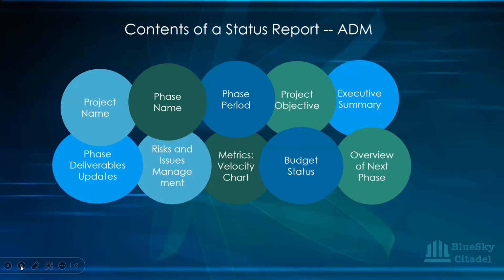And then going forward, definitely you'll be giving them updates about those risks. That's why I do mine at the end of every sprint, because all those risks, if they are not mitigated, or if the mitigating action that has been put in place is not working, before the end I provide that report. I'm meeting with my line manager to say, okay, this that we've put in place is not going to work. Are we talking to the person involved? Maybe it's a stakeholder, maybe it's a vendor or a third party that is involved, and seeing how we can manage that risk so that it doesn't become an issue.